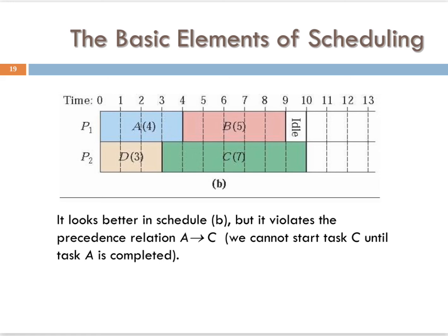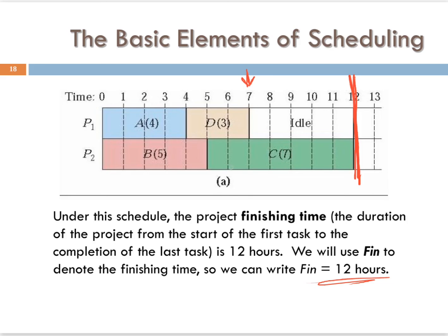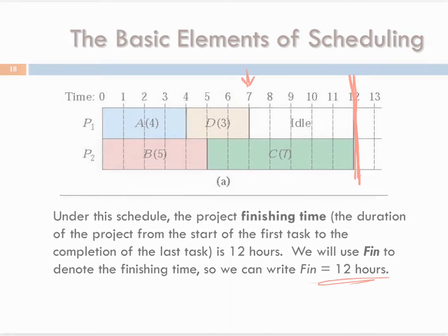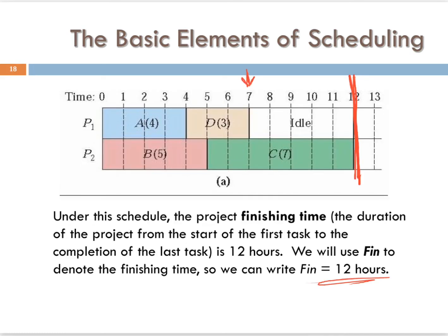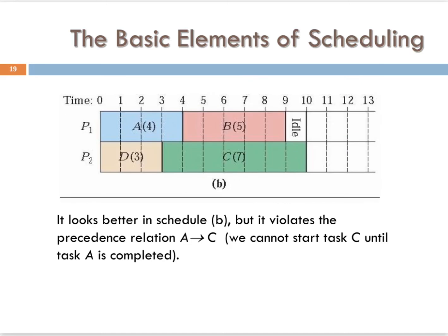What happens if we shift and we take C and let's just switch these around? So what happens if we take C and we move C down here? Well, we can't do that because didn't we say we have to finish all of the exterior body work before we can start painting the exterior? So this little overlap right here can't work.